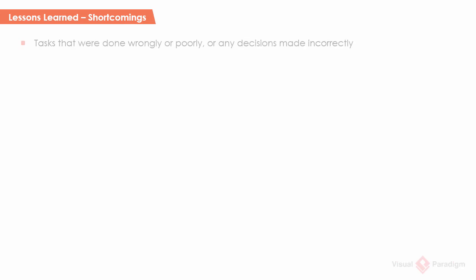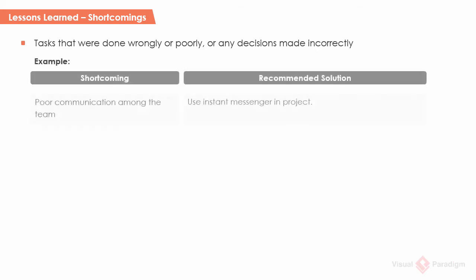Shortcomings are tasks that were done wrongly or poorly, or any decisions made incorrectly. It's sometimes confused with challenge and difficulty, but it is neither. Challenges and difficulties are adverse situations that required resolving in order for the project to complete, while shortcomings are faults and failures. For example: the team failed to communicate effectively, which is obviously a failure. A recommended solution must be made — in this case, it's advised that an instant messenger can be used.